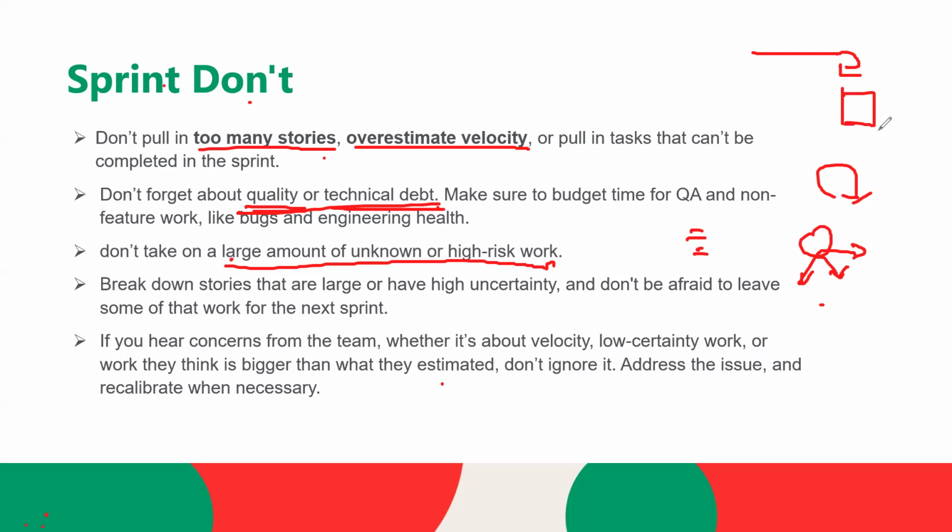You should not think that in this particular sprint we are planning to have this much work, and that's why I should not take leave. Everyone has a personal life also. If you do stressful work, it will definitely impact the project. So whatever leaves and holidays you have, you should take them, but in a planned way. You should not say the day after the sprint starts and everything is planned, I am going on 5-day leave. That will impact the sprint goal. But if you inform 2 months prior, then during the sprint planning call, everyone is aware of your leave.